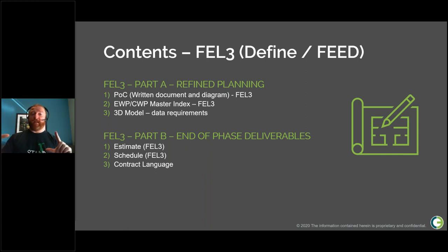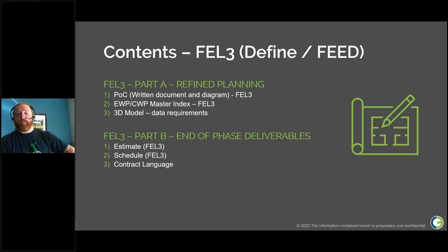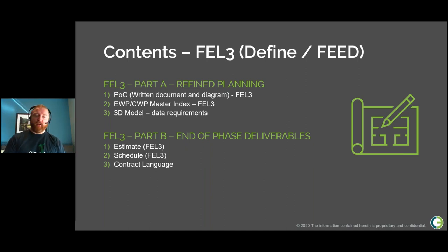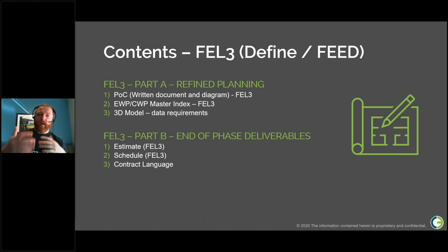FEL3 end-of-phase deliverables include updating the estimate and updating the schedule down to the CWP level of detail — a level three schedule where every EWP, PWP, and CWP is named, showing how work flows from engineering to procurement to construction. The topic of including AWP in contract language is also explored, covering best practice approaches for both content and timing.